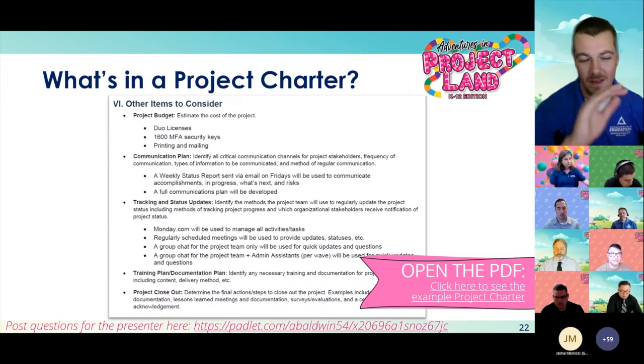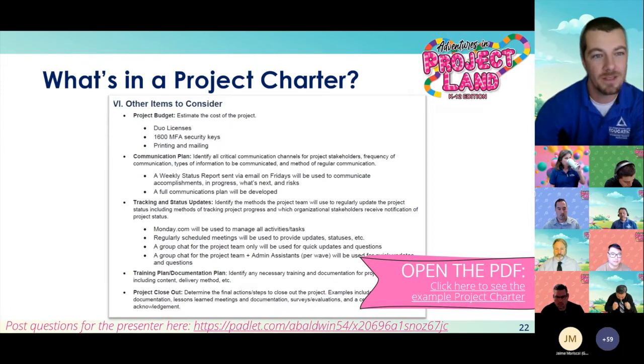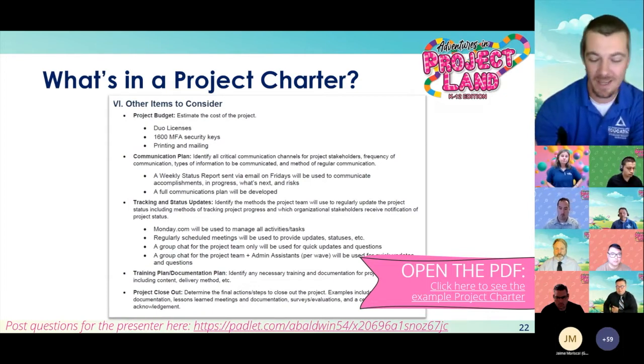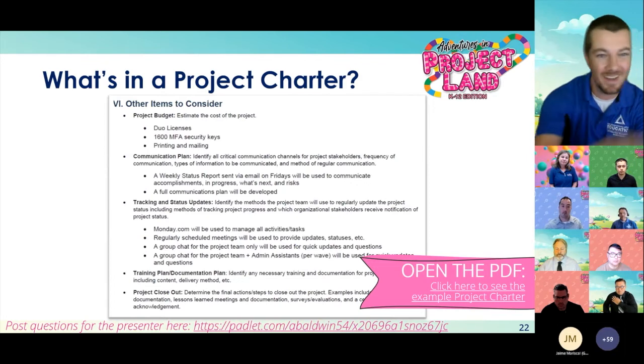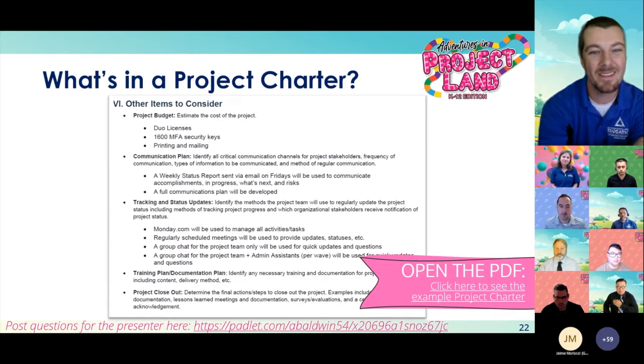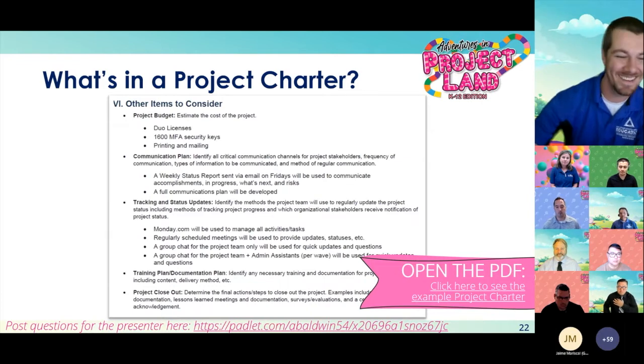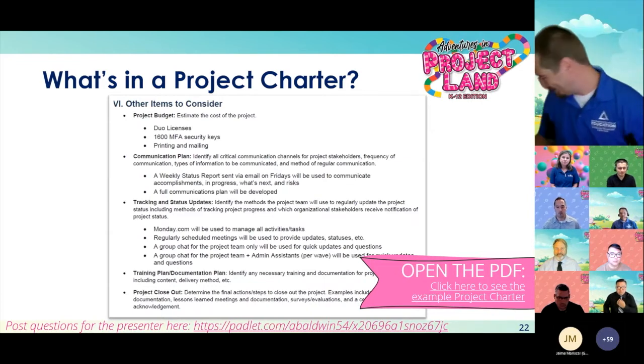And I just want to end off, the project charter is the document that authorizes the project to begin. So in our case, Terry was the executive sponsor. He authorized, yes, this plan looks good, go for it. That way he can't come back 3 months later and say, hey, wait, what are you doing? And then kind of yank the rug out from underneath us. That's part of the value, is kind of getting them to commit. And I see Terry smiling at that.